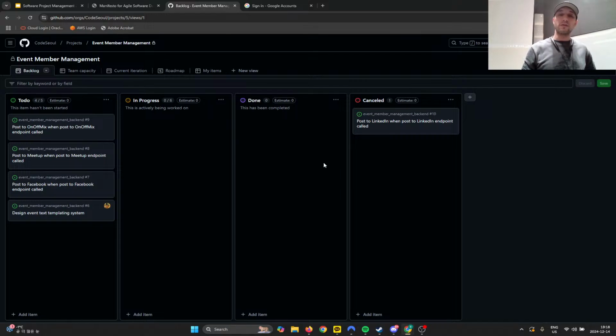Yeah, so Derek was saying that in his past experience, they had a hotfix column for things like bugs. And so hotfix was basically a way to circumvent the normal workflow, because if something appears in hotfix, you're working on it. But then also you need to have some kind of buffer in advance that you assign, like, hey, if we have a bug, this is the amount of time that we plan ahead that we can use to fix the bug. That it won't disrupt the entire sprint.